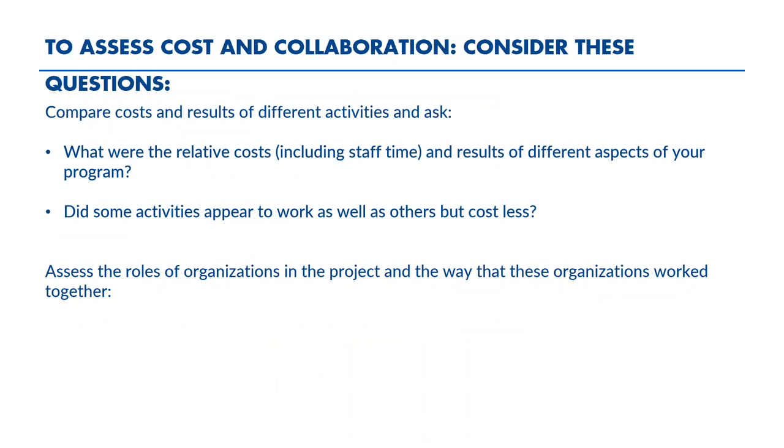All right, to assess the cost and collaboration components of a project review or any sort of lessons learned documentation that you'd like to produce, you compare the costs and results of different activities and ask what were the relative costs, including staff time, and results of different aspects of your program. So in this, you're basically comparing the costs, both in time and the financial costs as well, against the results that were achieved